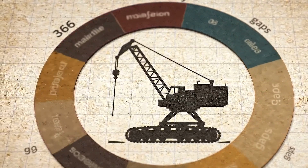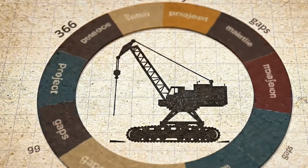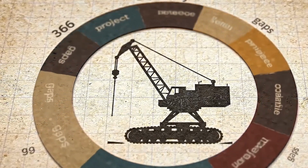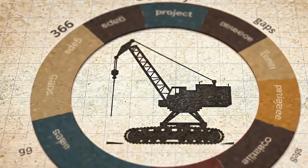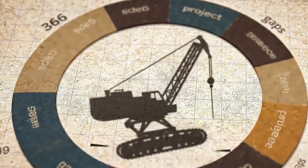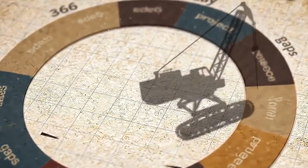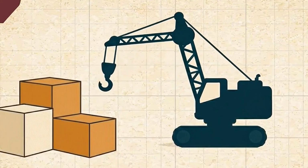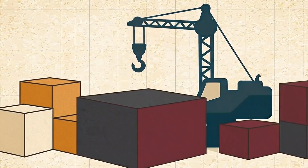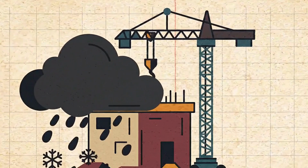equipment in service. OSHA's rules create a continuing inspection burden: post-assembly inspection, visual inspection each shift, documented monthly inspections while the crane is in service, and comprehensive inspection at least annually. None of that tells us exactly what an owner spends, but it does tell us that the economics cannot be reduced to fuel burned while lifting. A large crane is a capital asset surrounded by recurring labor, compliance, and support activity.